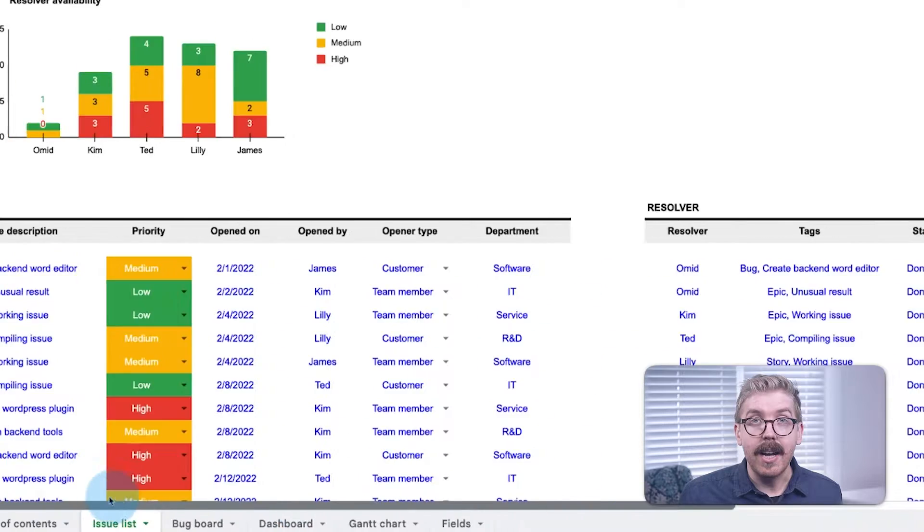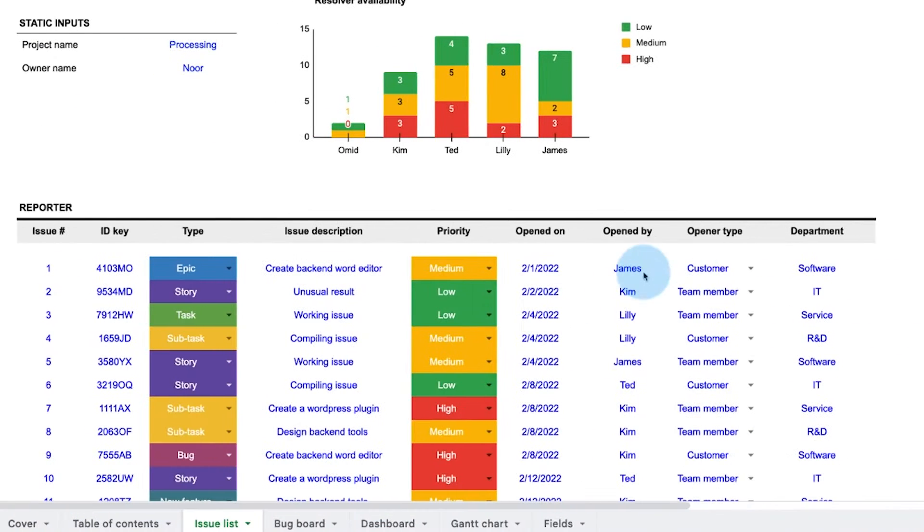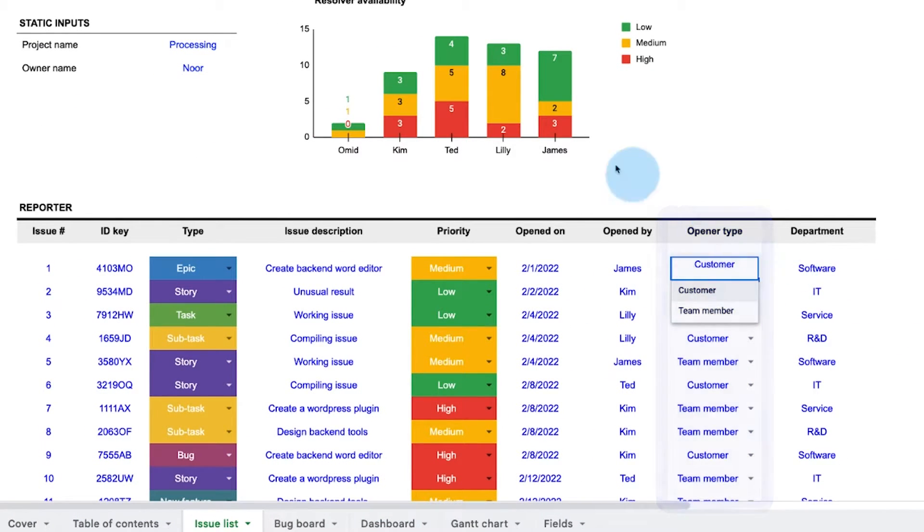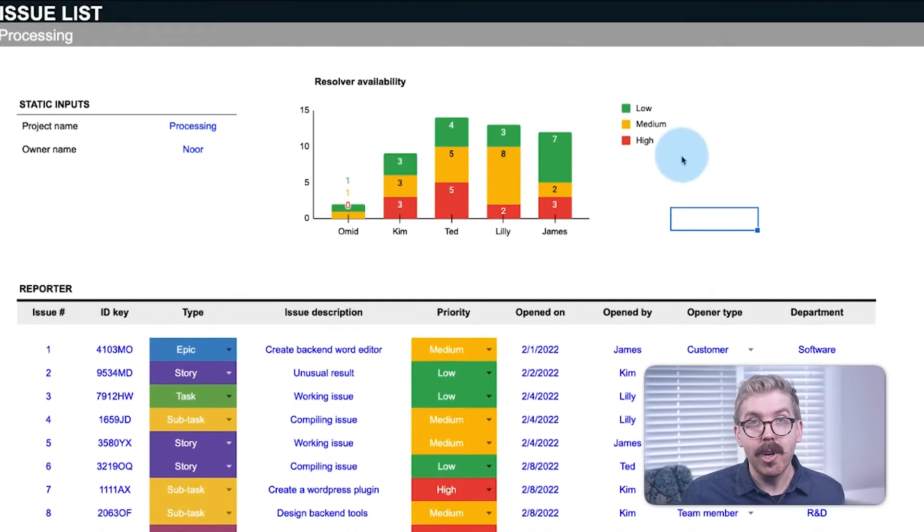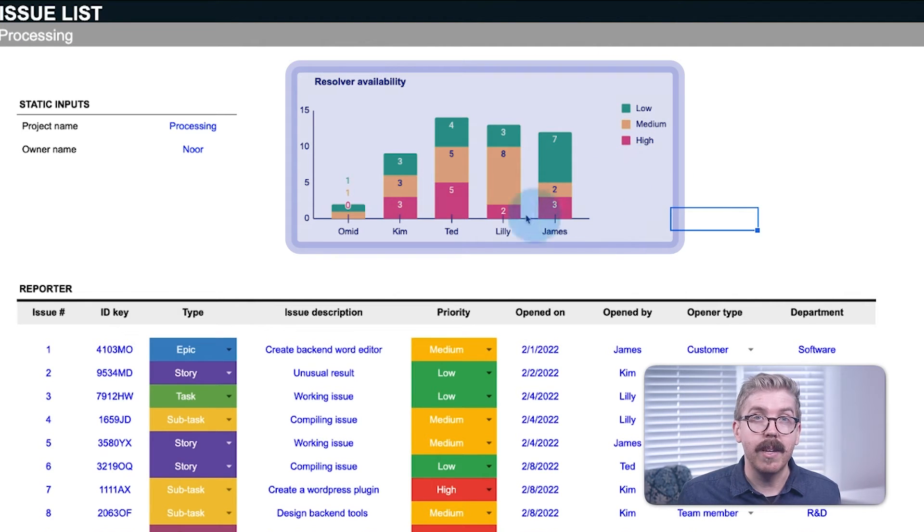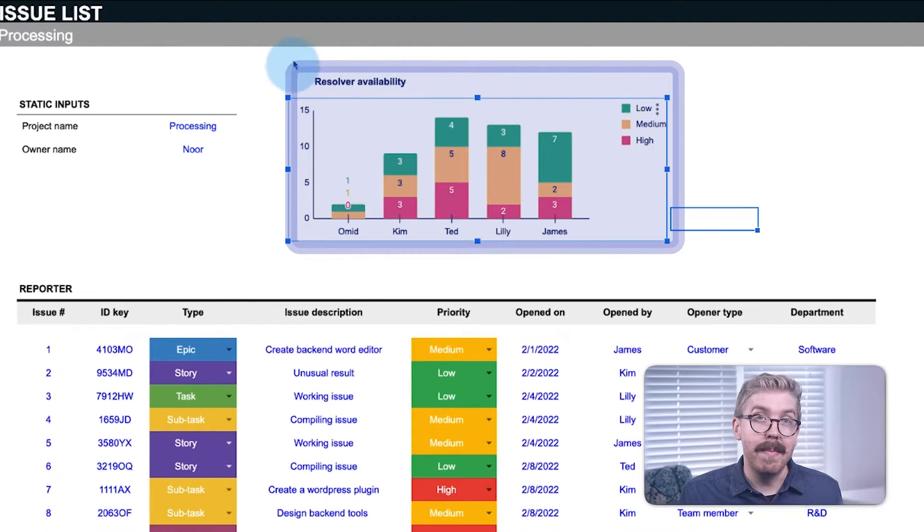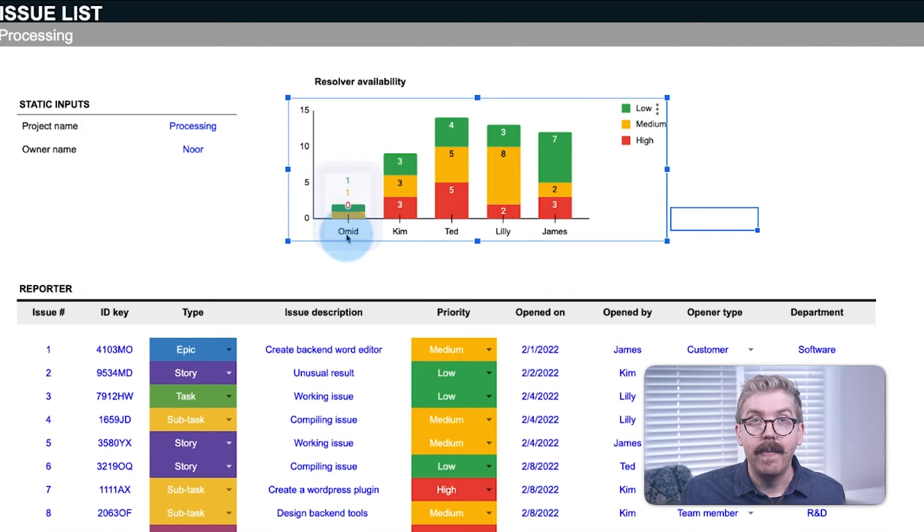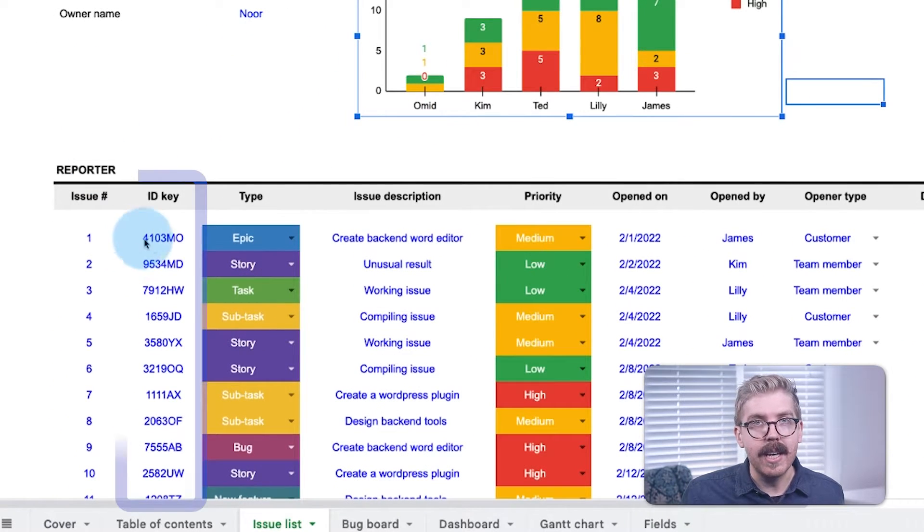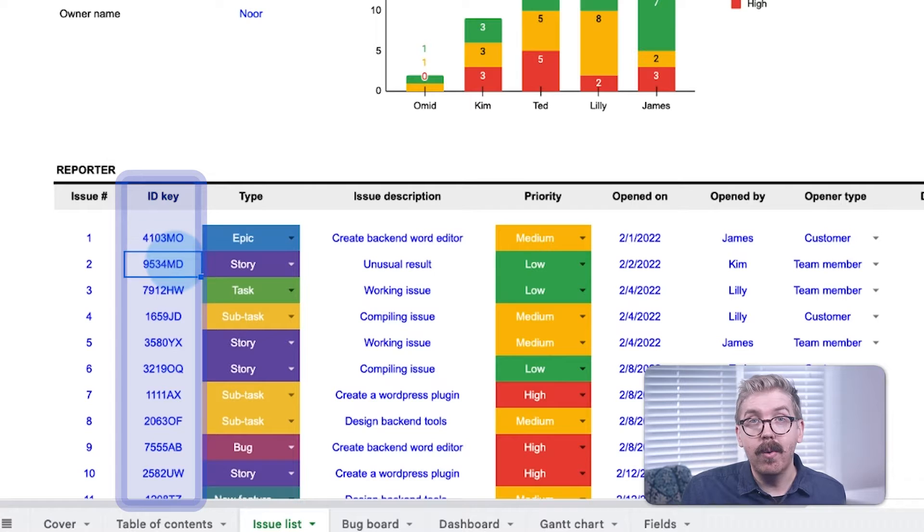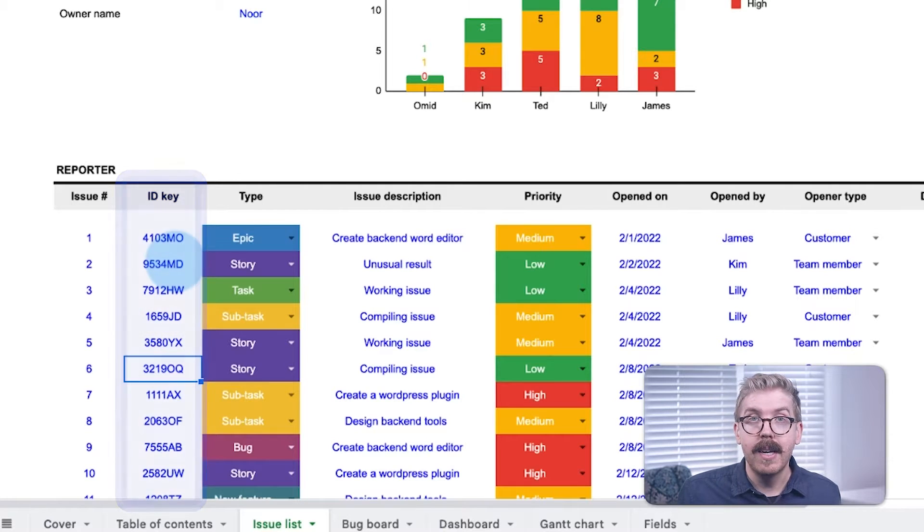Reporters can either be internal team members or external customers who experience issues. A chart at the top shows Resolver availability, so managers know whose schedule is the most open to assign new issues. And each ticket has its own ID key, which can be defined by us or the ticketing software that we use.